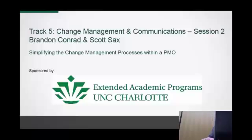And also, I guess what's not really mentioned there is we do go over the impacts. As we're going through these different changes, usually, and it's not always the case, there's been some sort of an assessment saying, here's something that's going to change and here are the other pieces it's going to impact. That way, when the CAB is looking at this change request, they're also seeing that assessment. It's based off of what the project manager thought the change was going to affect, and also folks in the PMO who have that eye on the big picture of all the projects.